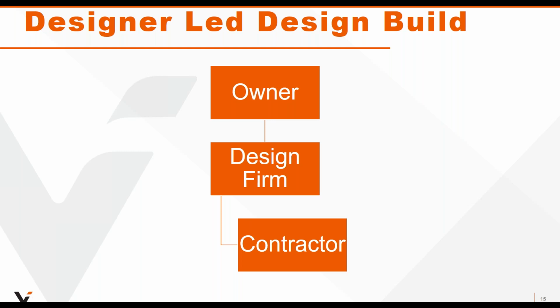it could work. We see often that the design firm will set up a separate entity that takes on the design build contracts. The practical challenges are oftentimes related to, if it's a public project, bonding capability, right? If you're supposed to provide a performance bond, sureties typically want to see significant balance sheets to issue a performance bond. And if you don't have that, or in addition to that, they often require personal guarantees from the owners of the firm. So, a lot of architects and engineers are leery of putting themselves out there to that extent. So that could be a bar.